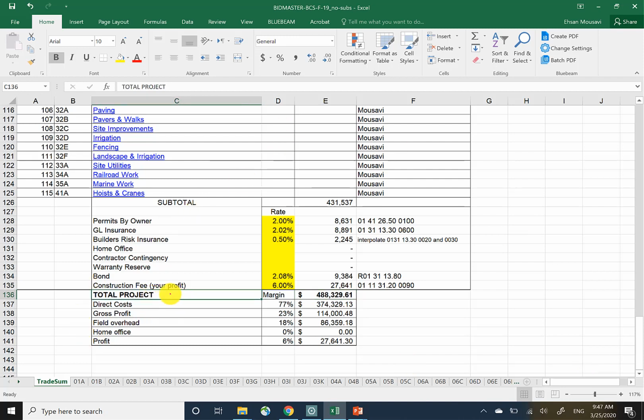So we said that your markup or total project, let me also say bid sales, is comprised of two major items, correct? Item one is direct cost, and item two, which is labeled here gross profit, is really nothing but indirect costs, right? And we said that in turn, number two is made out of 3 plus 4 plus 5, right?